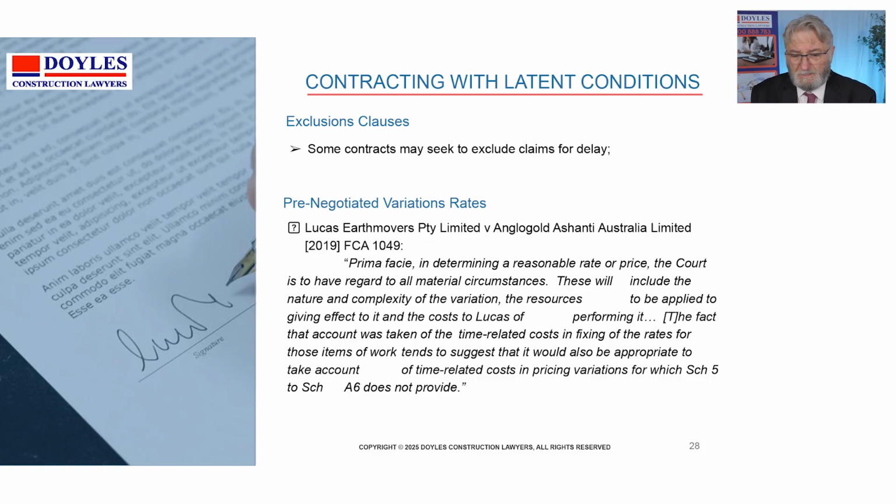So you ought to be careful of exclusion clauses. You ought to be also careful these days of people linking up indemnity clauses with them. So they say, we exclude all information given to you about safety on site, and we require you to indemnify us if anything bad happens to us arising out of safety on site. And while that clause seems very fine to sign on day one, 2 years later you can find the indemnity clause having a massive effect in the sense that it sweeps in all sorts of responsibilities and liabilities which weren't previously contemplated.